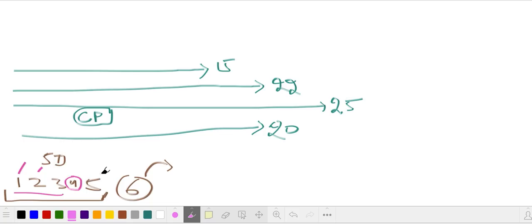By the end of the 5th day, I have to complete this activity. My starting of this activity can be late, but the starting of the other activity can't be delayed. It doesn't matter which day I start, I have to finish on the 5th, because on the 6th day another activity is going to start, which depends on this.